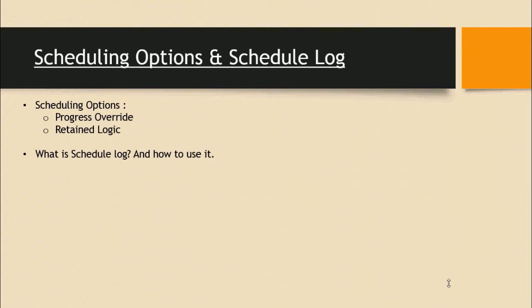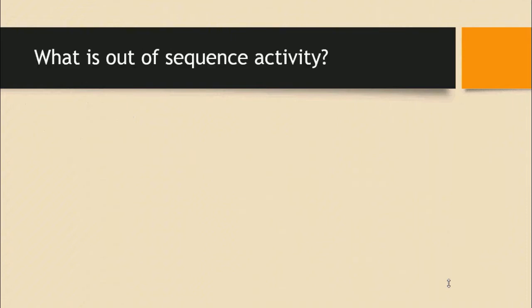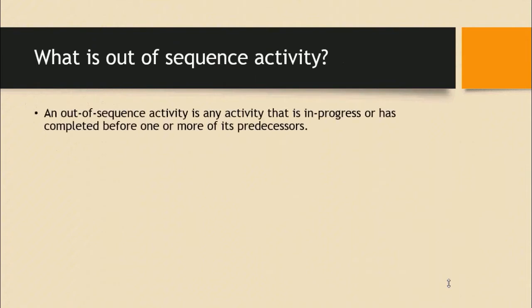Before moving on to our topic, we first need to learn about an out of sequence activity. An out of sequence activity occurs when an activity starts or completes well before its predecessor is in progress or is completed.